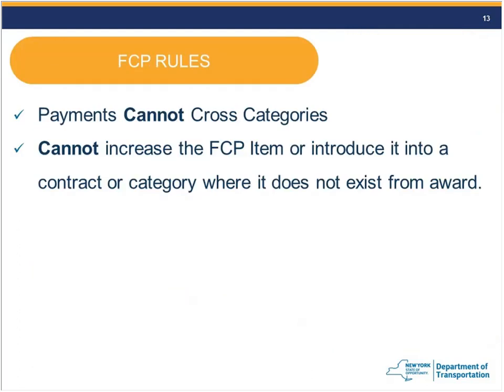Okay, good. So there's some rules for the FCP. So we'll go into the FCP, but remember again, one of the biggest takeaways from the FCP is use this liberally before we necessarily break thresholds. We don't have to wait till it turns into a big thing. We can even run the FCP to add quantity, even if we know 2 months later we're going to add more to it. We can use the FCP to get it up to that 125 or whatever, or the 200, whatever we need to do. So that's the big takeaway, really key in on those ones because it doesn't require anything from the contractor, it doesn't require any analysis.